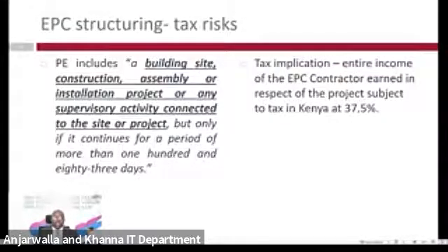And for that reason, even though this risk is primarily a risk on the EPC contractor, because of the potential risk that it carries on the project company, it then becomes very important to ensure that this is structured correctly. And in terms of the contractual documents, the liabilities and obligations of each of the parties are clearly spelled out. And in the event that the EPC contractor was to then create a taxable presence in Kenya out of their actions or actions of their employees, then ideally they should be in a position to reimburse or indemnify the project company for any liabilities that then they may end up suffering.